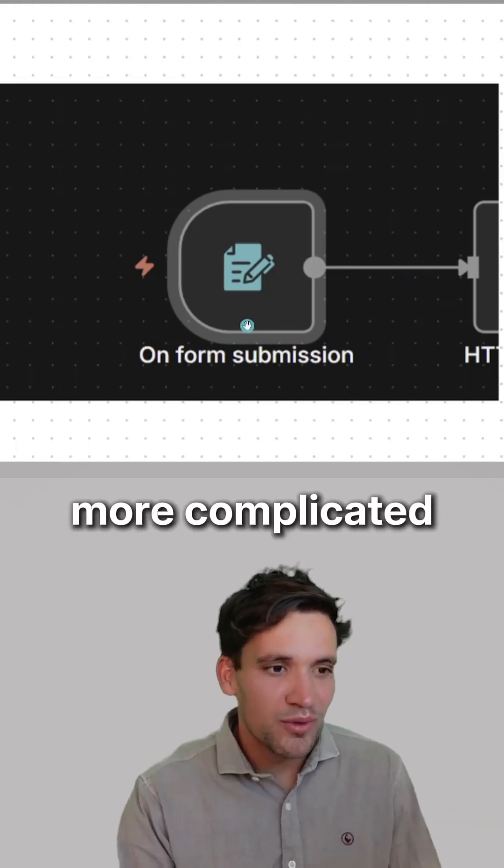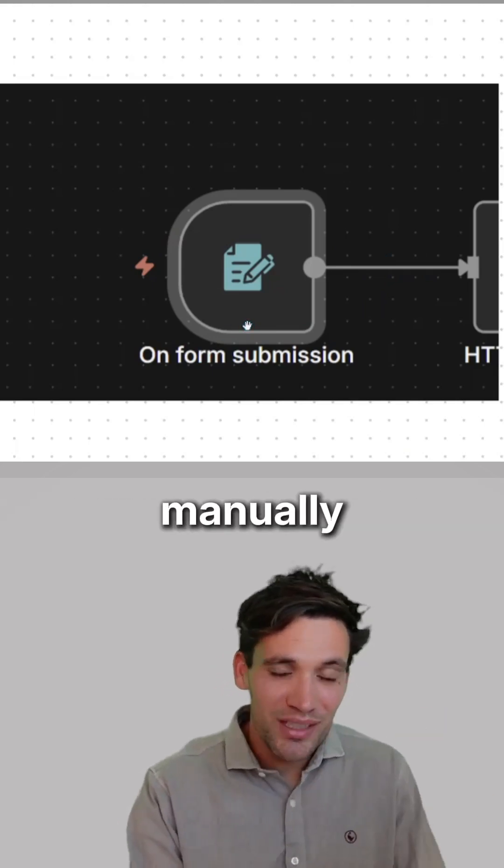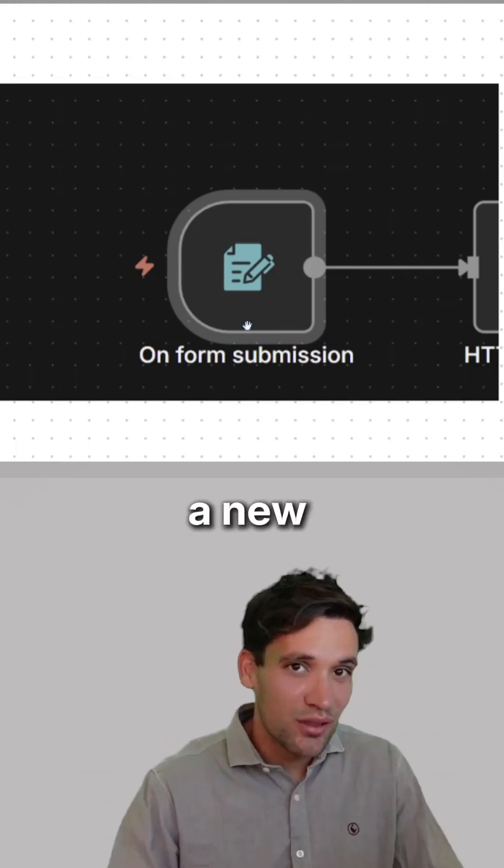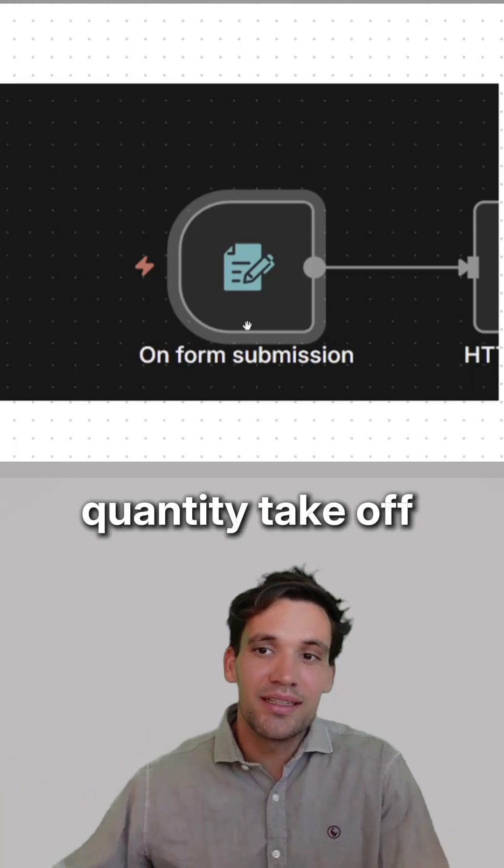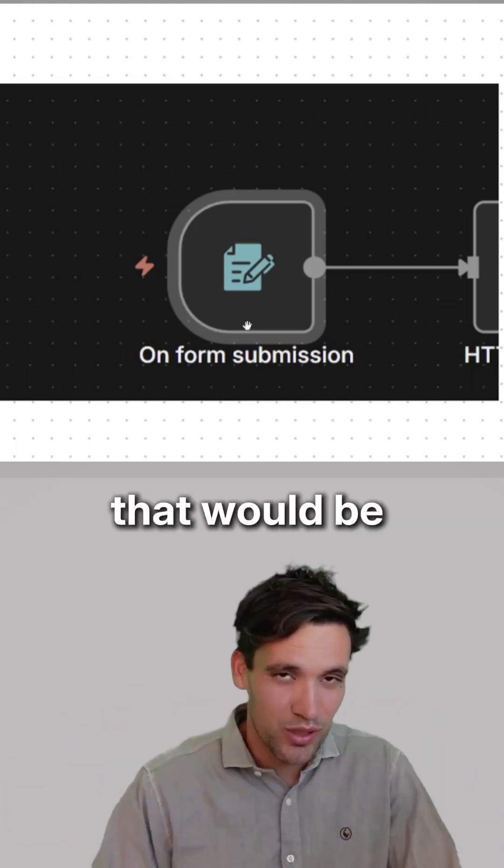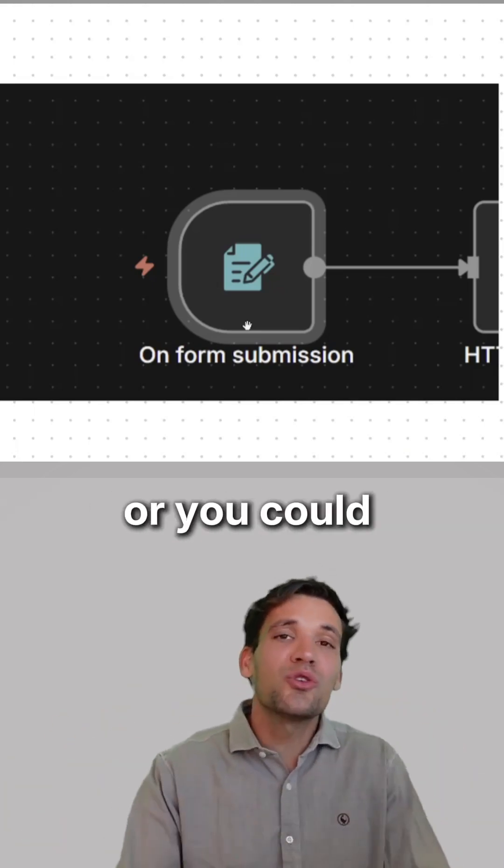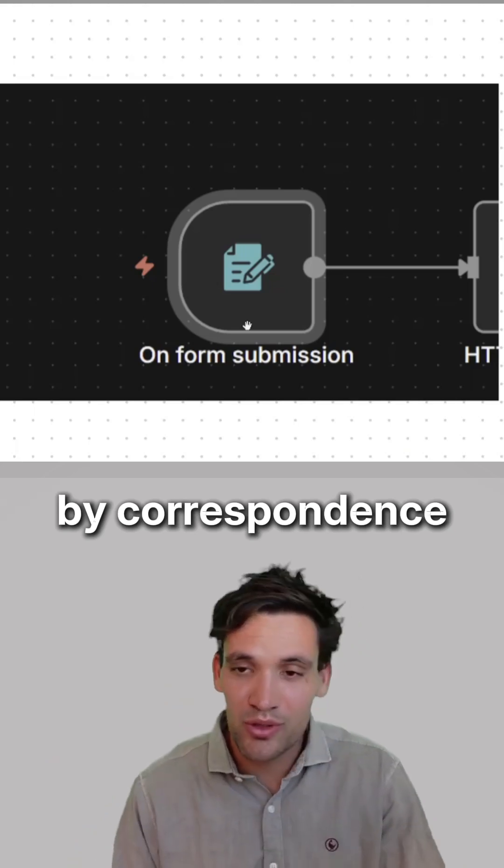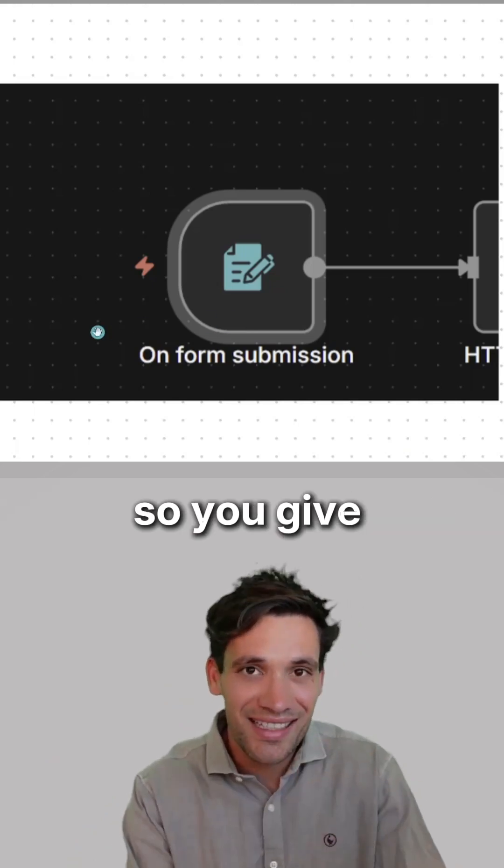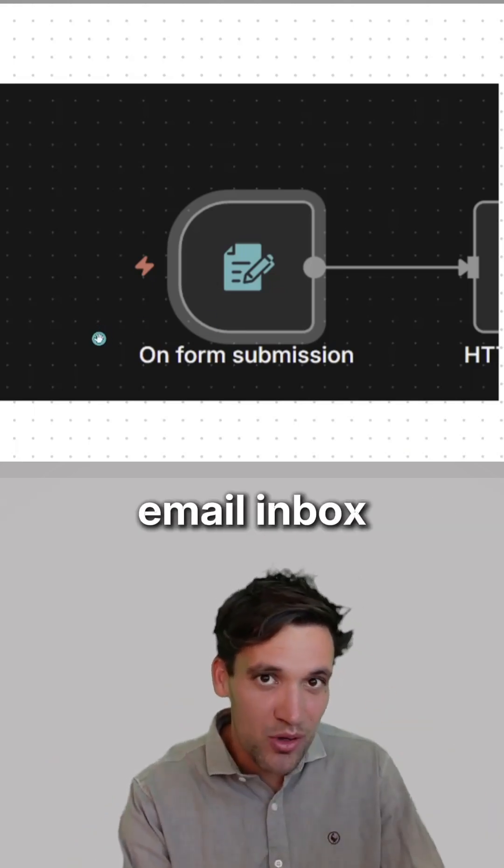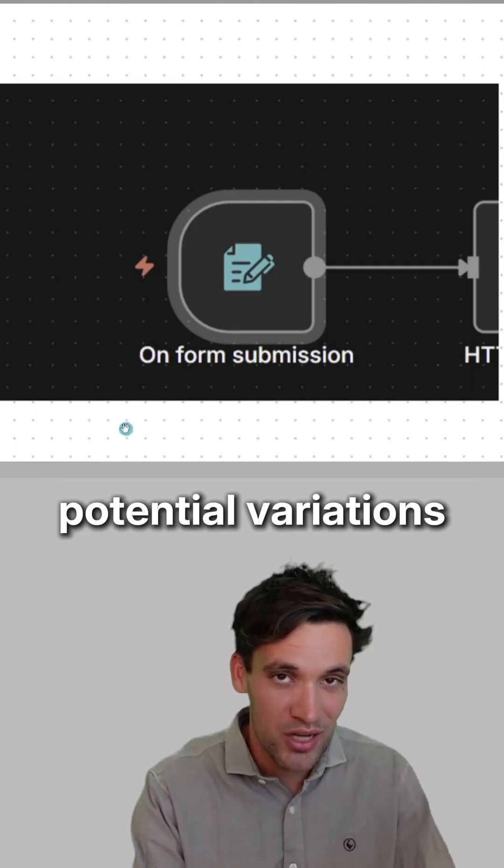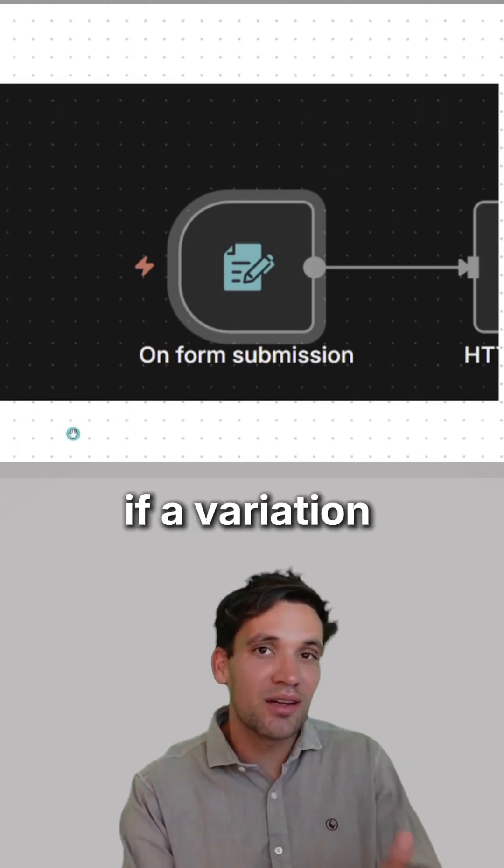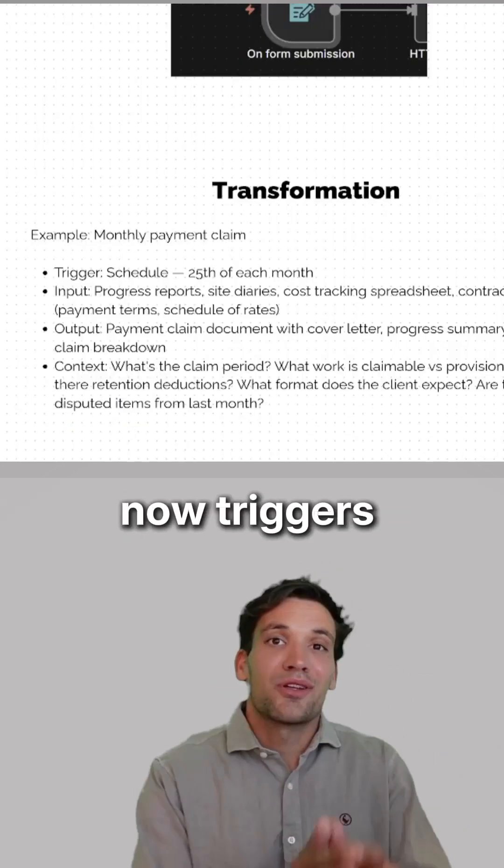Event triggers are more complicated. You may want to trigger it manually - like when you get a new set of drawings and want a quantity takeoff done, you would upload the drawings. That would be the trigger to the task. Or you could have it triggered by correspondence - you give AI access to your email inbox to flag any potential variations from the client. If a variation comes up, you follow these steps.